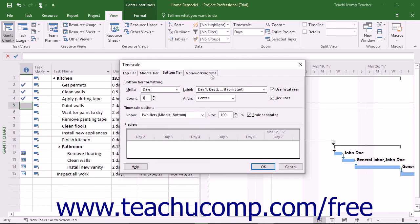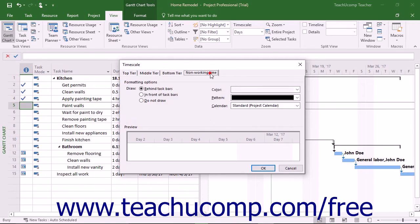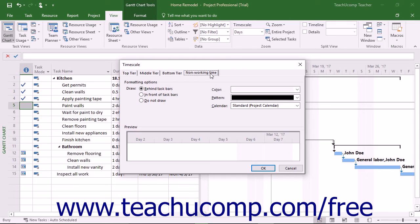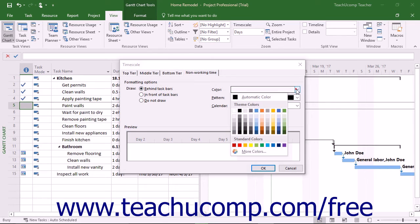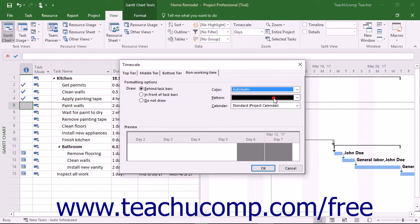Next you can click the Non-Working Time tab within the Time Scale dialog box to set the appearance of non-working time in your view. You can select the desired option for the display of the non-working time from the choices shown in the Draw section. Next you can select the desired color, pattern, and calendar to use for the display of non-working time.